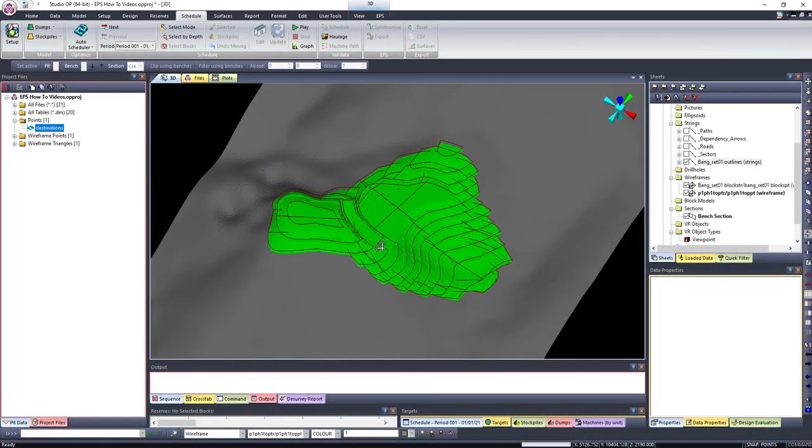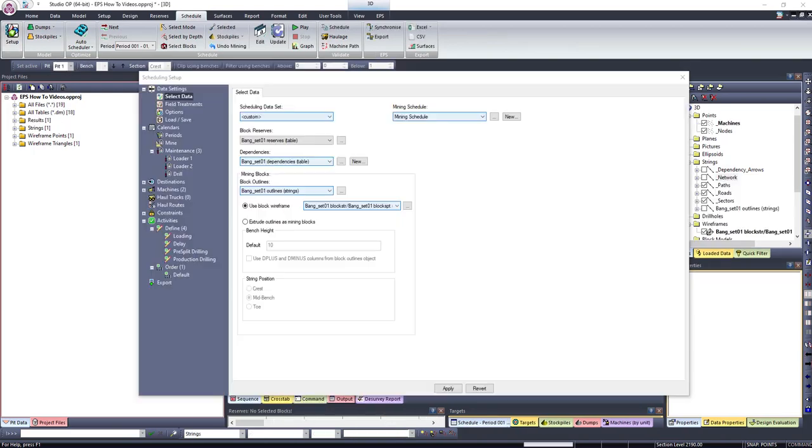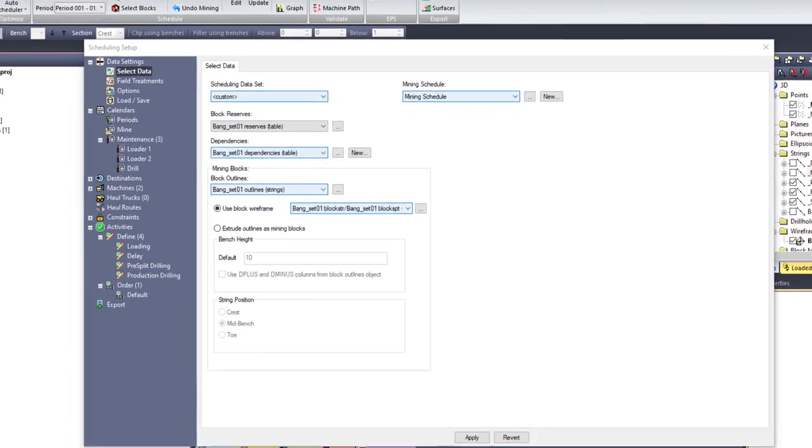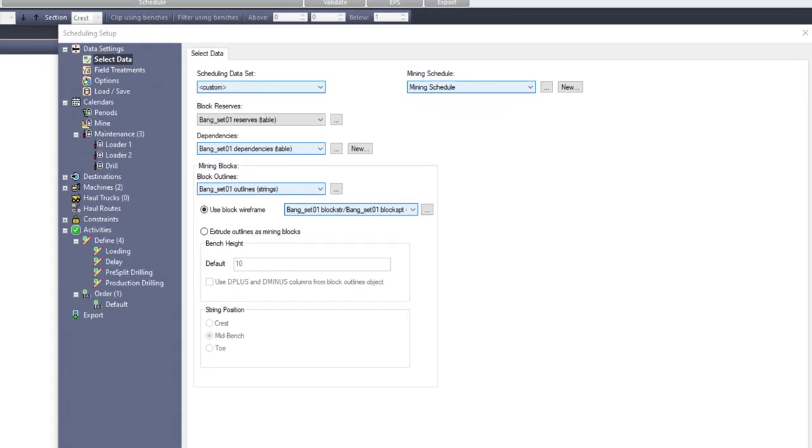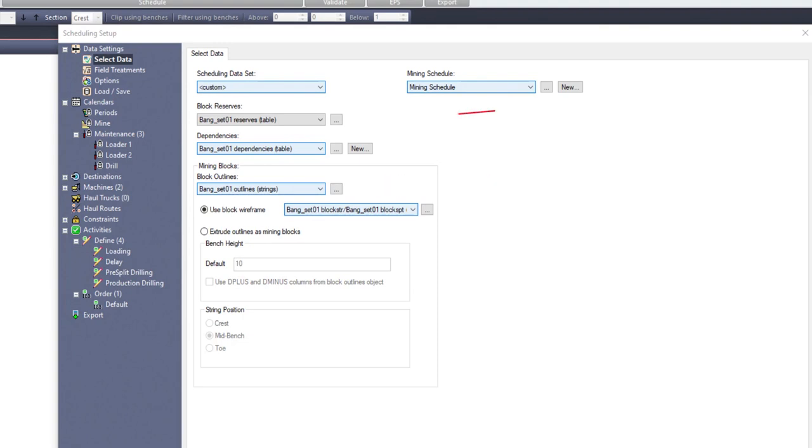In order to link Studio OP with EPS, you need to have designed a scheduling dataset on Studio OP which includes the mining block solids, the mining block outlines, the reserves file, and dependencies which are optional.